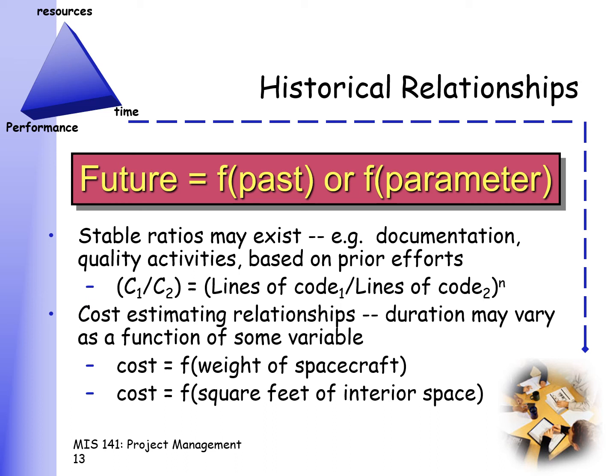Okay? Another way of looking at it is for every 2 days of programming, you will have to allocate 3 days of testing. Again, that's another standard, another rule of thumb based on historical data.